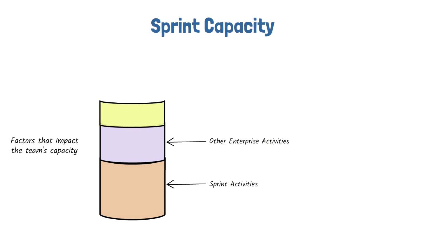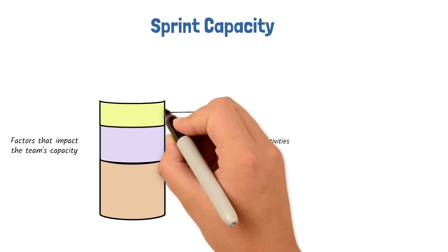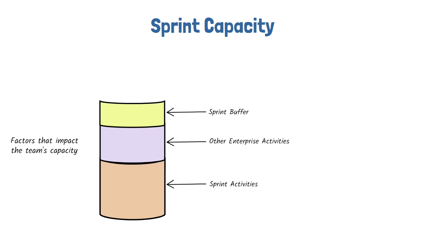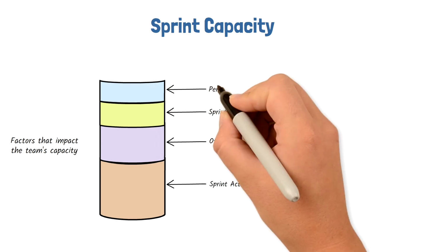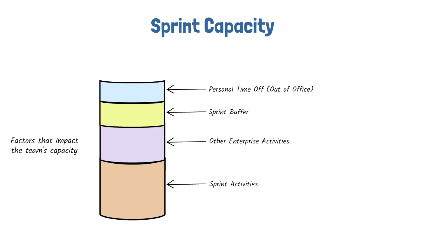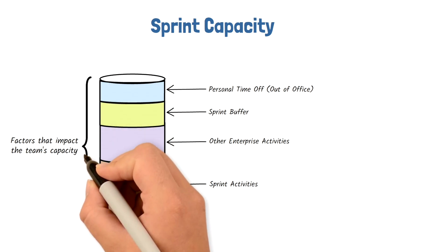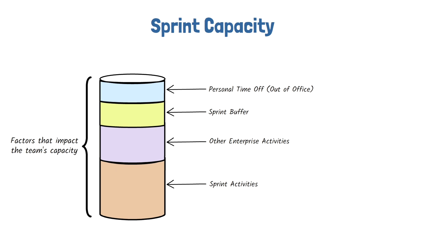We should reserve some buffer time against things not going quite as planned. Plus, consider the personal time off for each Scrum team member. These are the biggest activities that occur during the active sprint. Assuming the team is using story points as their estimation method, determining capacity is the same as predicting our team's target velocity for the upcoming sprints.